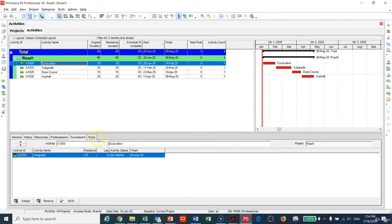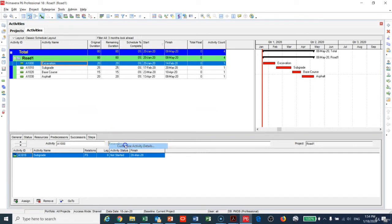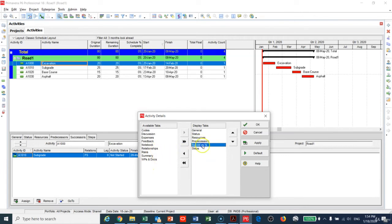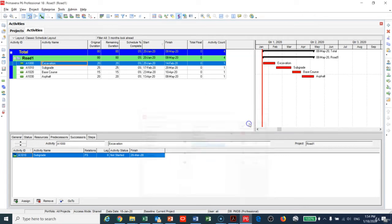Or you can go down here and choose the Successor and the Predecessor. You have Successor here, and if you're missing any of this, just right-click Customize and you can add whatever is missing—Predecessor, Successor, Resource, etc.